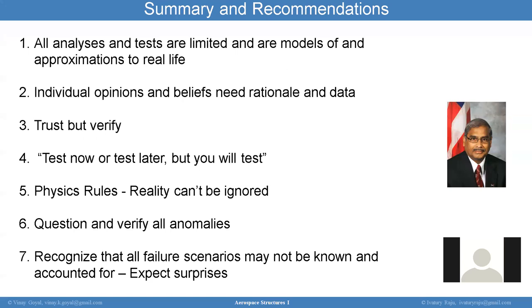And then if you couch it and you say, well, listen, I don't have all the data, we're going to proceed to test with a lot of risk, and you just let them know that there's a risk. But you should be very clear with your program management and your technical team what is getting cut by cutting the corners. Does that make sense? Yes, beautifully said.